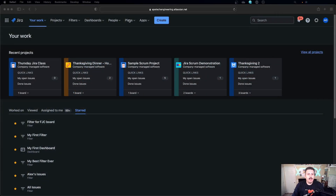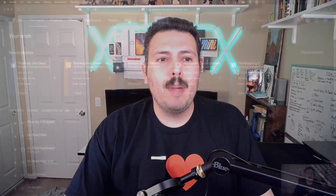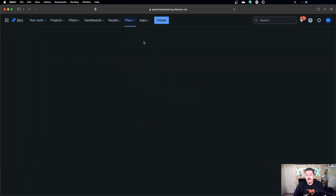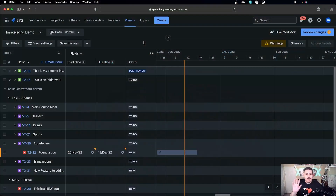Just to level set what we're talking about here — I am talking about an advanced roadmap. This will only work if you have Jira Premium, meaning you need to have the advanced roadmap capability. If you have that capability, you will see 'Plans' up here and then you will have a plan. As a prerequisite, you should have an existing plan in order to embed it in Confluence, otherwise you've got to put the cart before the horse. So make sure you create a plan — this is just whatever plan you have, any plan will work.